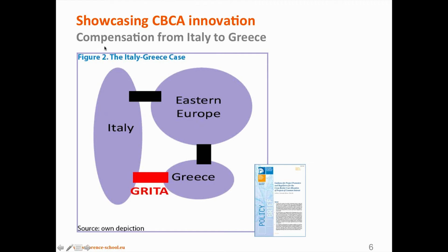So that's what I mean with compensation. Compensation in this context is a deviation from the current practice. So Italy agreed to pay more for this project because it was a higher beneficiary. But it does not strictly apply the beneficiaries pay principle because the 75% was not necessarily coming out of a magic formula. The countries also didn't know exactly the benefits for both, but there had been some CBA analysis and then some negotiation led to an agreement.